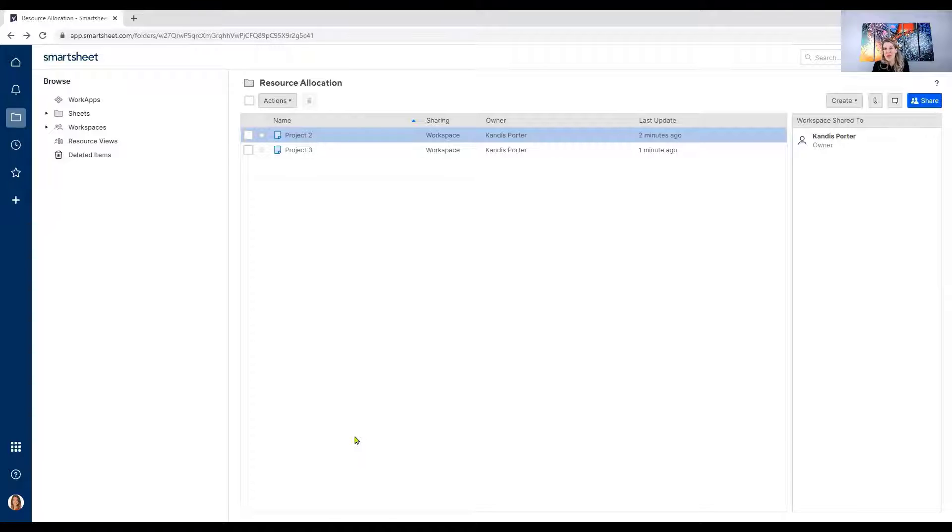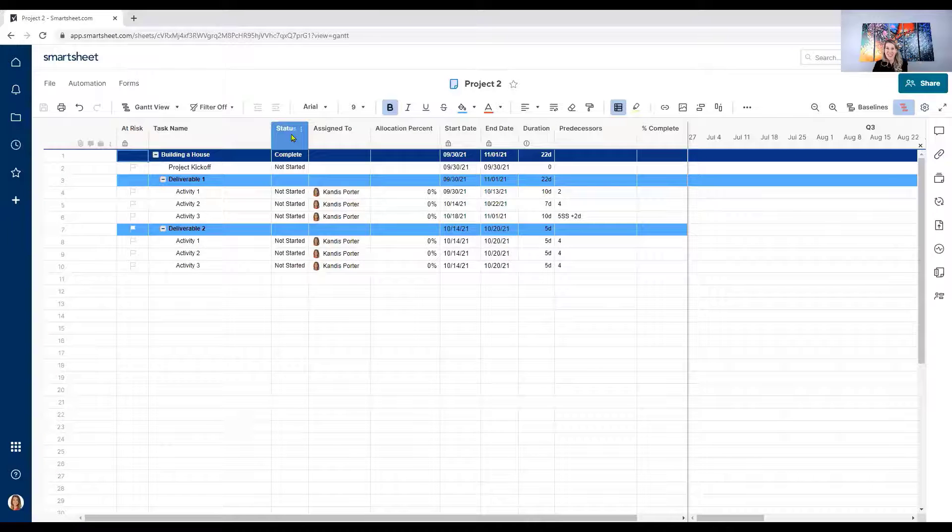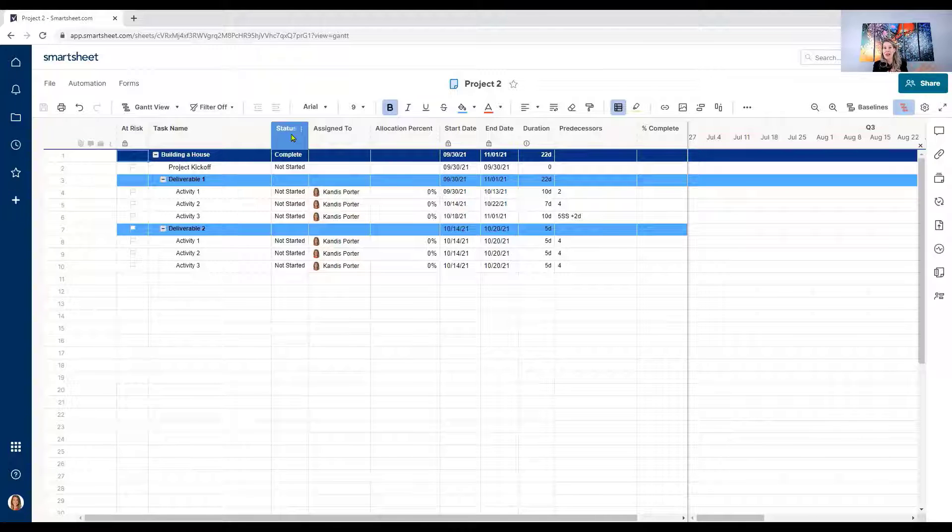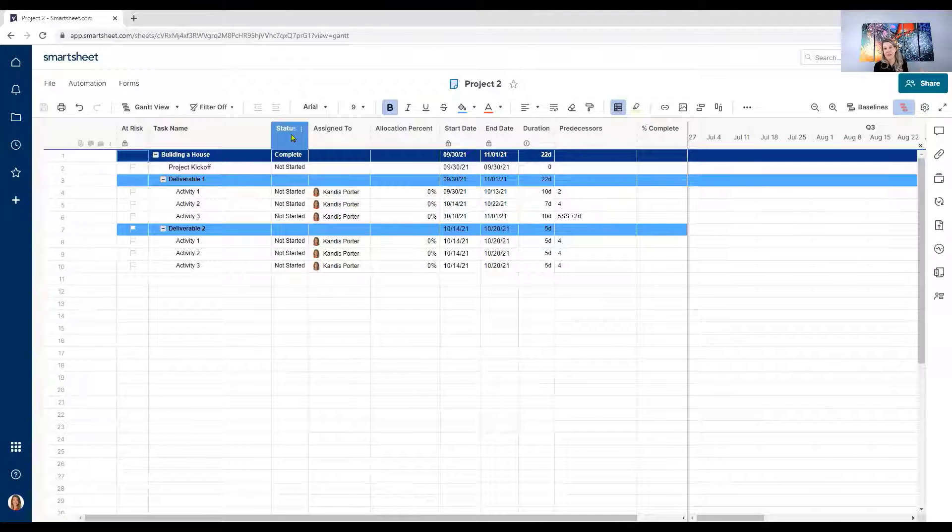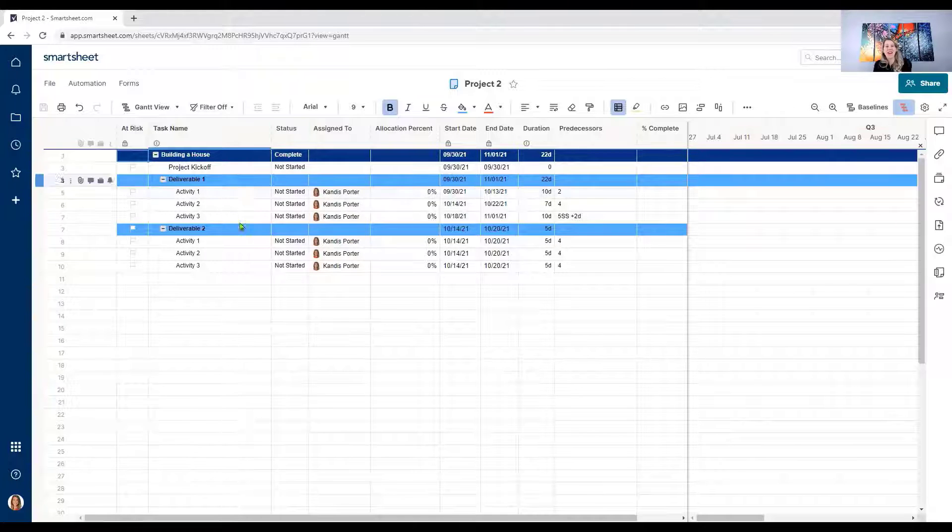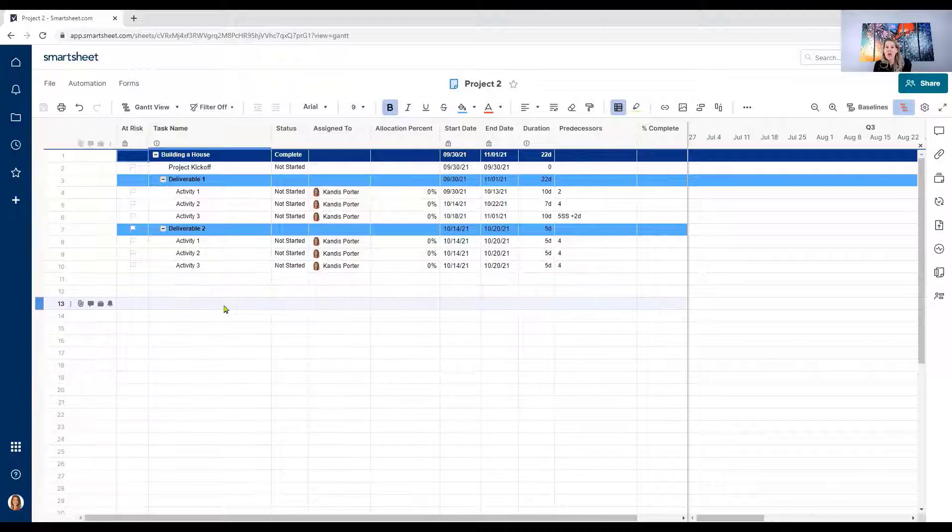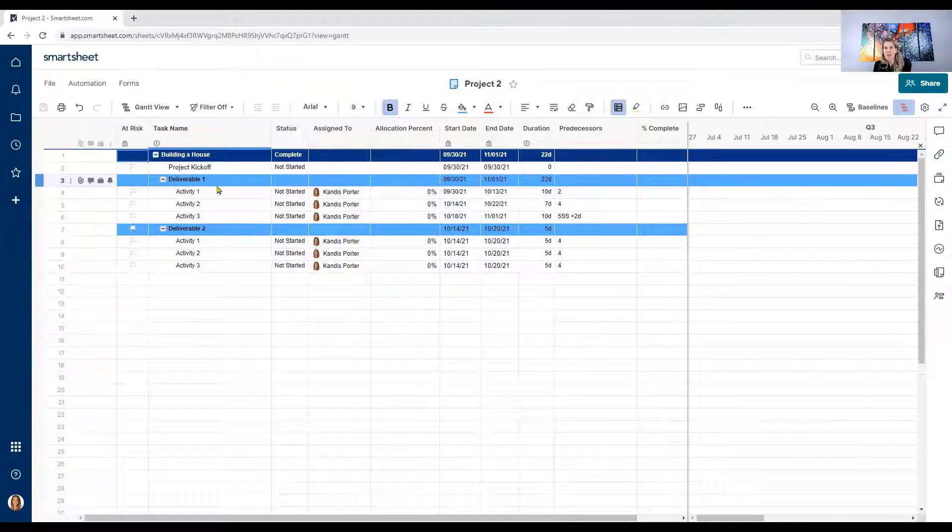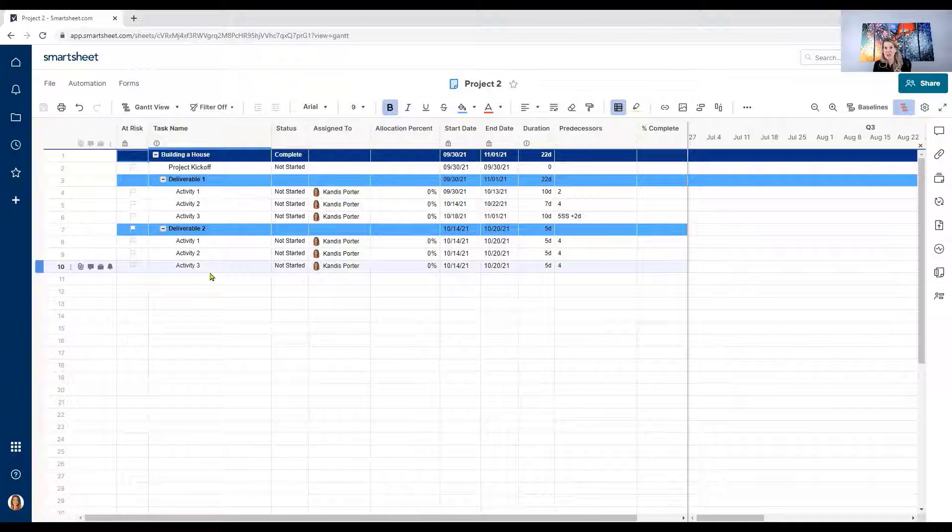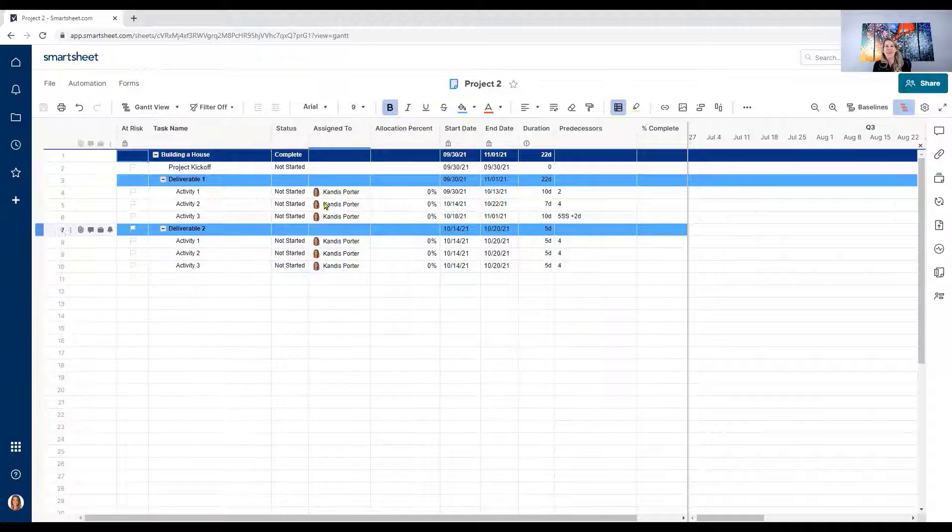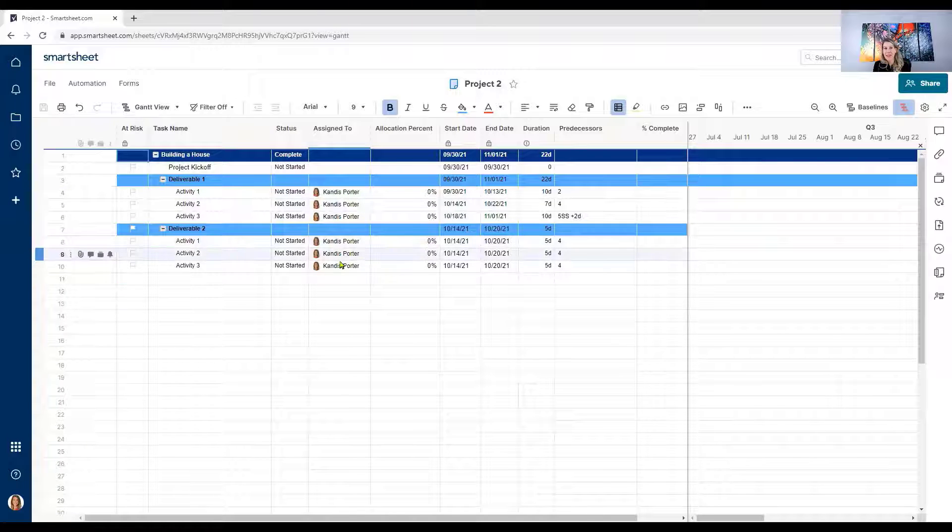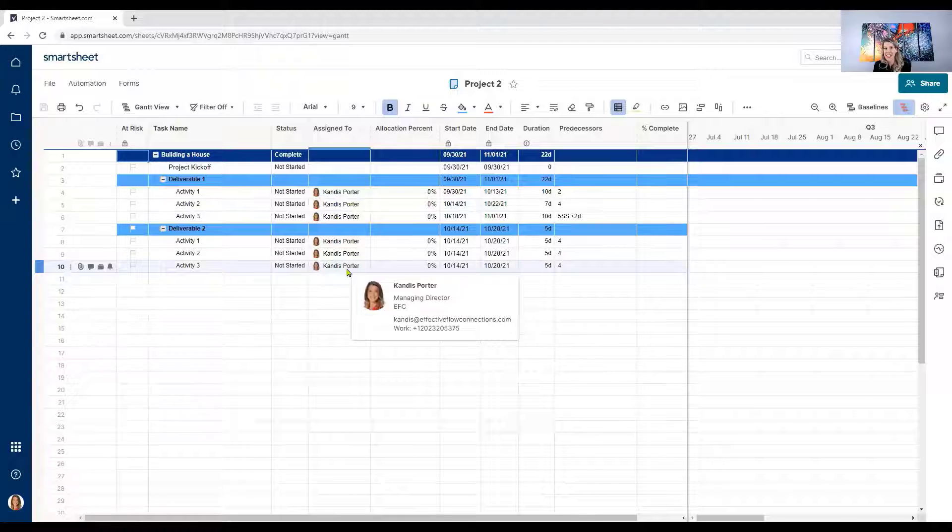I'm going to go into project two now and show you how I have this set up. This is very simple, just to show you how you can go about doing this. I have an entirely separate video on how to set up a project template using the tool set. So take a look for that if you're wanting to learn how you can use a Smartsheet template to set up a project from scratch using your predecessors to help drive some of the due dates. So you'll see here, I've got several different columns here where I've got the task name column, my work breakdown structure. So I have a deliverable, three activities, another deliverable, three activities. Again, keeping this super simple, just to show you how to set up this resource allocation. None of the work is started yet. And look, Candace Porter is going to be really busy because Candace is assigned to all of the tasks in this sheet.